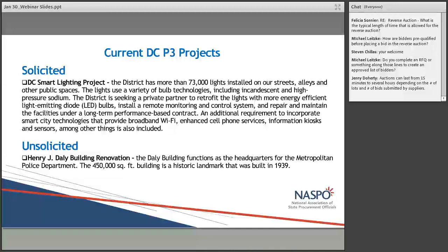When it gets down to the shortlisting, at that time, the requirement is fully fleshed out. And again, they're asked to validate and revalidate their financial capacity. And they are presenting a price, of course, based on certain factors that are set so we can evaluate apples to apples. Interest rates, of course, which fluctuate. But at the time of proposal, certain variables are set in place or assumptions are made so that we can make sure that everything's viable. At that time, it's the traditional cost evaluation, with price points associated as an RFP evaluation criteria.